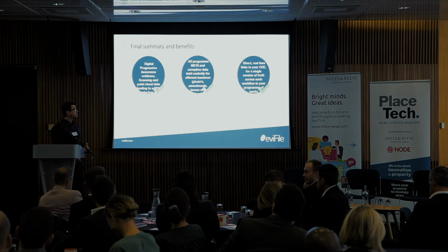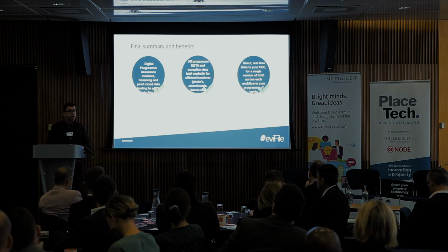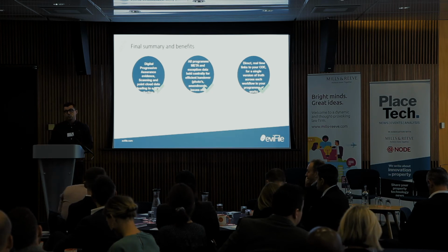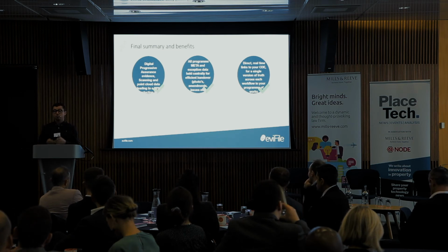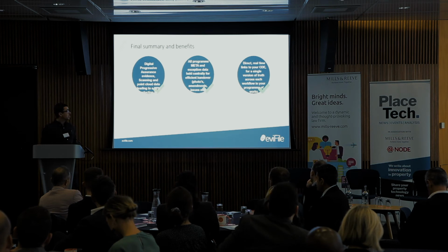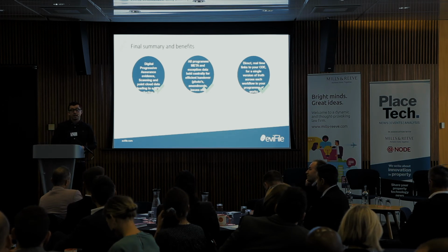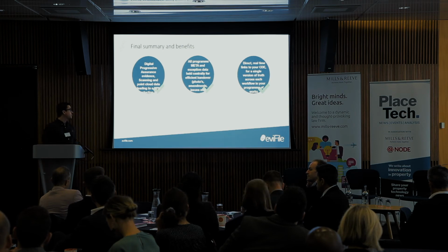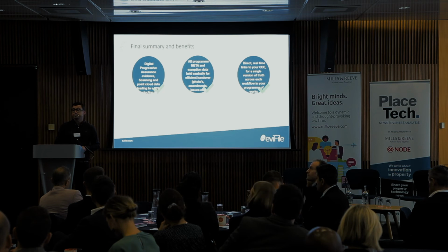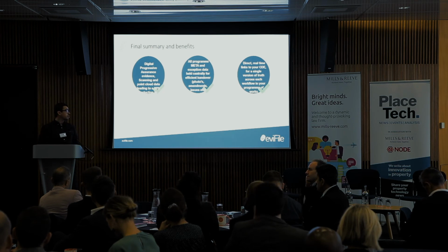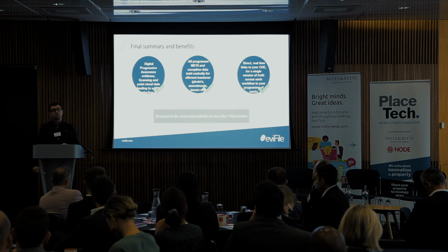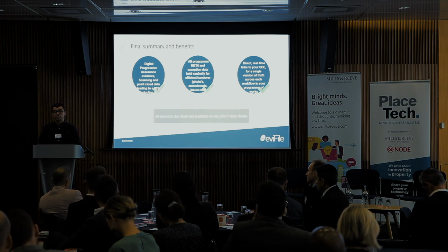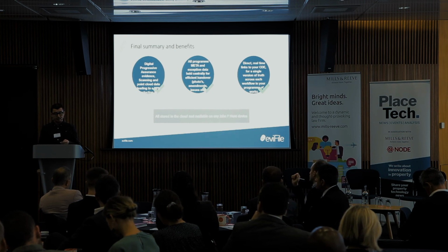Finally, we linked this all into the common data environment. So all these different platforms and tools, we worked tirelessly with Jonathan Hunt to be able to make them all interconnect. And what that essentially gave us was a one-stop shop for all of that information that would flow into the CDE and would then be delivered as a final handover and evidence that the job was done to specification. And we've seen some huge benefits on top of this from just having everything available in the cloud on any device. We've seen anything upwards of 20 to 25% efficiency savings across our projects just in time saved by having access to all the right information at the right time.